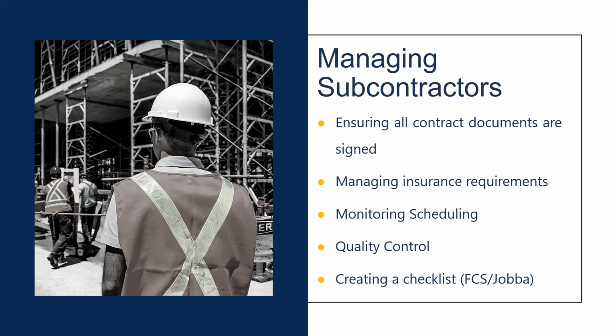Okay. So, having a system in place where you've got a superintendent going out, engaging and creating reports that not only identify to the customer what the status of completion is, but also allow you to monitor and track that as a member of management. And then again, creating checklists. I'm a big believer in creating a system that is as close to foolproof as possible.